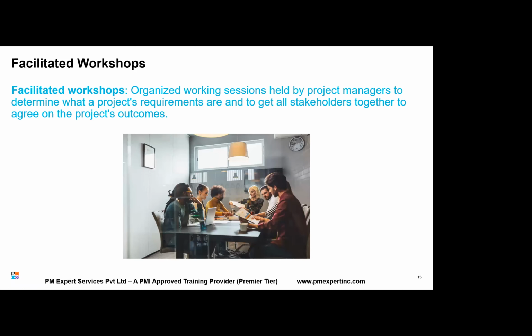Now, a facilitated workshop is a way to generate requirements. You can have people from various areas sit together and brainstorm about the requirements. These brainstorming sessions are facilitated by a facilitator. The difference between a facilitated workshop and a focus group is, in focus groups, we expect people to give a variety of opinions, whereas the purpose of a facilitated workshop is to arrive at a consensus.